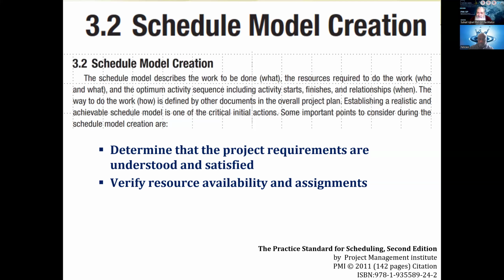And once that is approved, the baseline is unfrozen, and then you again start creating the various further instances of the schedule model. There may be a couple of instances, and when it stabilizes, you again request a rebaseline, and that's how this thing goes on and on.